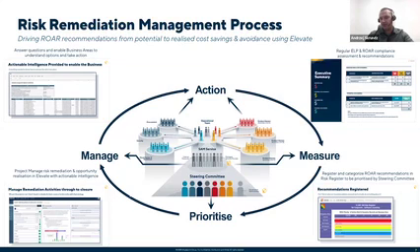I enter the risk into our GRC tool, and it's grouped by the vendor. Then to each vendor there are multiple scenarios, or one scenario, based on the ROAR findings. And each scenario is about the problem, what is going on, what the issue is, what the risk statement is. There is information about which business area is impacted the most. Might be one, might be more, as ABB is decentralized, so it's not always obvious which one that is.